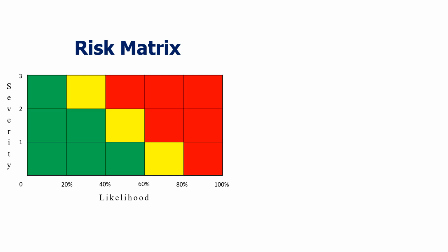The trick is, the matrix needs to stay the same no matter where in your business you're looking at a specific type of risk. So what do I mean by that? If you want to know what risks could upset, say, your ability to do business, then every risk that deals with that, whether it comes from a new product offering or a new piece of sales software or a new facility, the same risk matrix is used because you're looking at the same end result. What is it going to do to my business? This way we can compare risks and choose which risk to work on first.